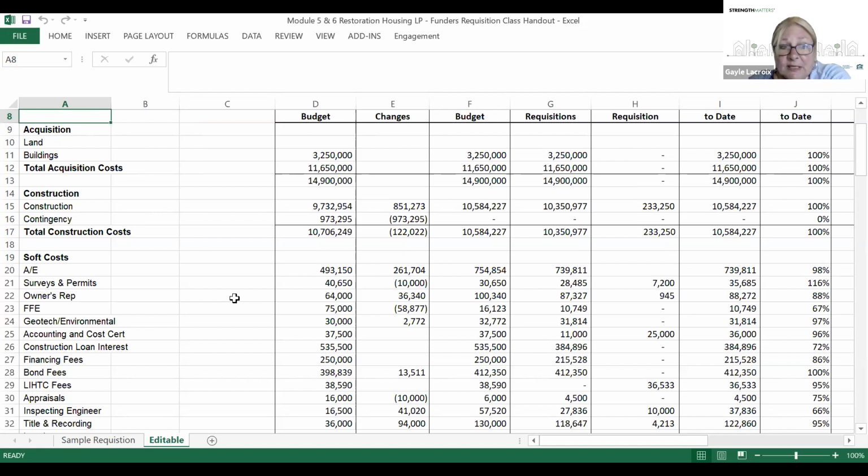Financing fees, those are quite expensive sometimes when you have bond dealings and bond fees. Bond fees are also quite expensive. It's very expensive to do a bond deal, particularly with legal fees involved. I think somebody estimated here in Boston, it's between $600,000 and $800,000 of additional cost if you're using tax exempt bonds. So that's usually a fairly hefty line item in your budget.